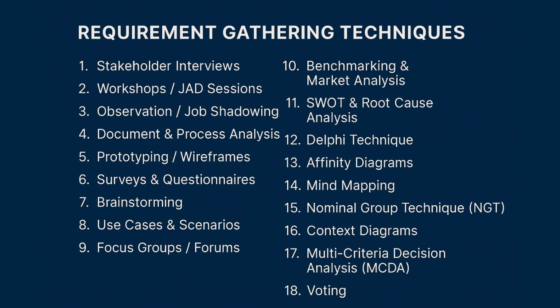The decision making process is also simplified if a single person is assigned to represent the entire group and make the decision for the entire group. When there are conflicting opinions, groups may also take a majority approach. The group chooses the decision that more than half of its members support. If there is no majority opinion, the group has one more option. It can go with the decision that has the largest number of supporters. This is known as plurality. As said before, voting is all about majority, unanimity, and plurality.